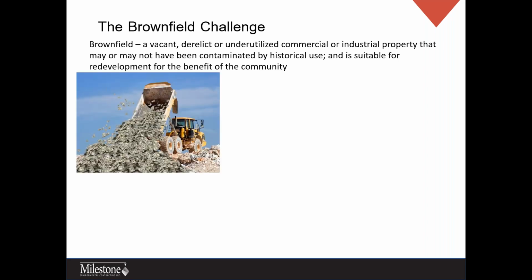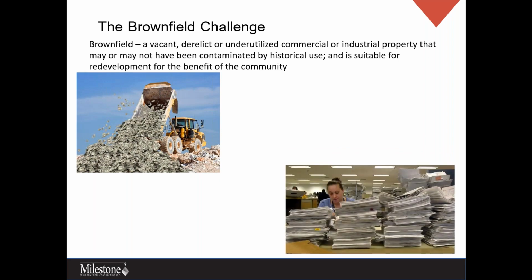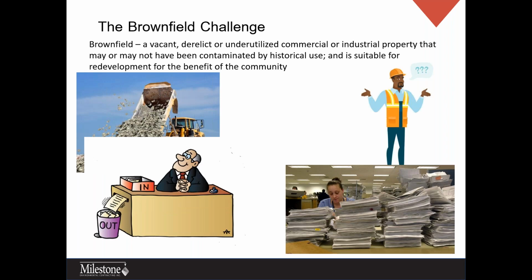Cost to remediate can be high. Traditional dig and dump can be an expensive exercise and sometimes outstrip the land's value. Complex environmental regulations and municipal land use policies often can slow down the process and mire it in red tape. Despite the best efforts of project teams to evaluate the impacts, it's not always possible to gauge the scope of the issue with 100% accuracy. And an increase in contamination can increase costs to remediate and typically impact the schedule, which will also increase carrying costs. Slow regulatory review and approval can further impact schedule.